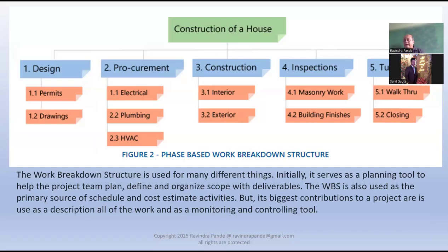So you submit the blueprint image online in whatever format they want, and you normally wait a few hours or a few days, and they'll give you an email, SMS, or WhatsApp saying your blueprint has been authorized. Your blueprint might need some updates or suggestions as per the municipal guidelines, and you might have to implement them.